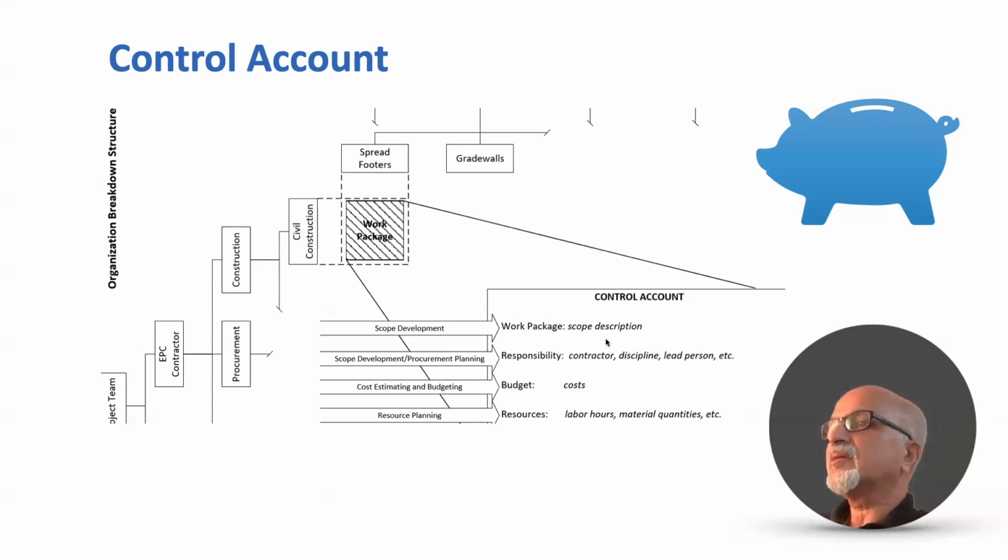Work package name, scope description, work responsibility, contractor, discipline, lead person, etc. Budget, the cost we should provide, and how many resources are required, etc., become part of the control account. Every work package will be associated to a control account.